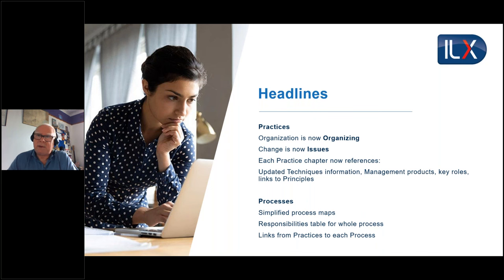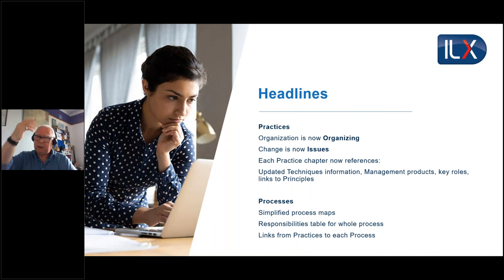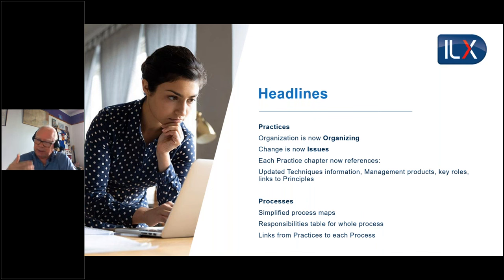The seven processes are still in place: Starting Up a Project, Initiating a Project, Controlling a Stage, Managing Product Delivery, Managing Stage Boundaries, Closing a Project, and at the top, Directing a Project. There is still a flow of information from starting up, through directing, down to initiating, then escalating up for decisions, delegating work, getting it back, and so on.